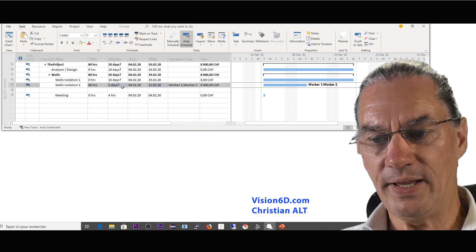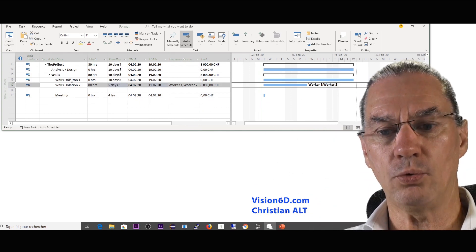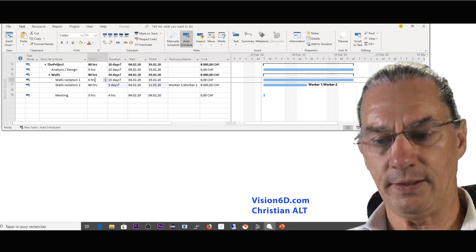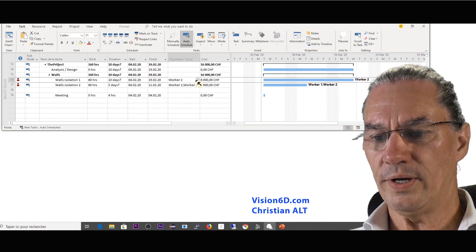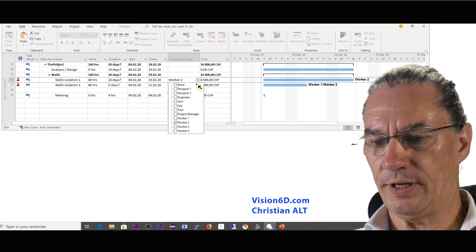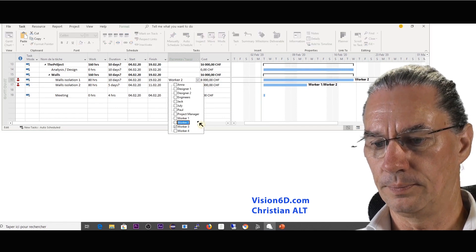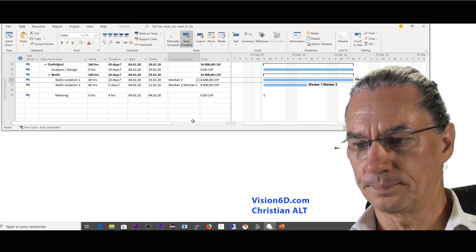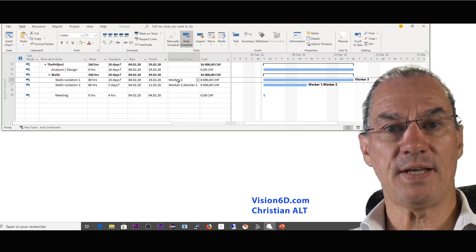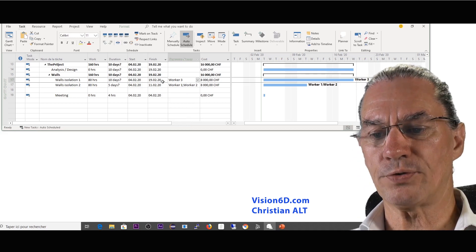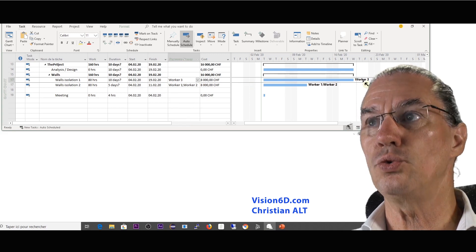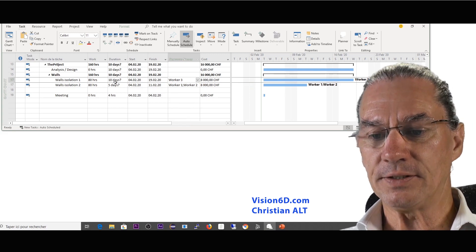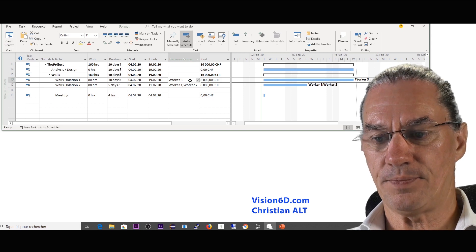With this I'm going to look at wall isolation number one. Again the same 80 hours. We assign it to worker number three. We see that it's exactly the same. 80 hours for worker number three will last two weeks and in all it's 10 days.